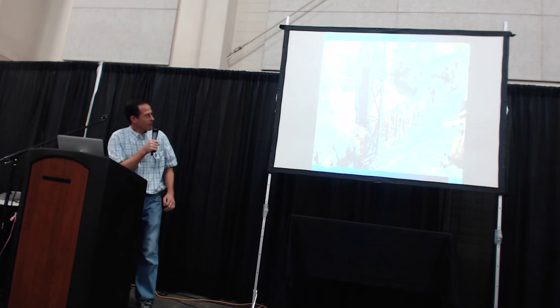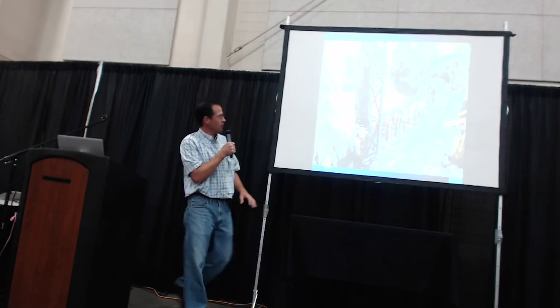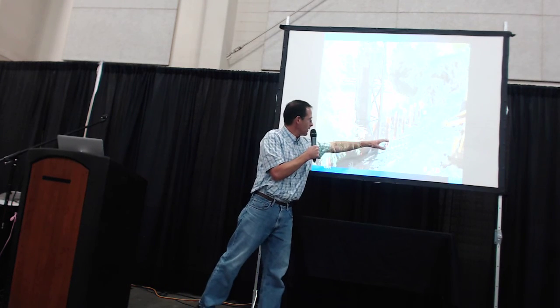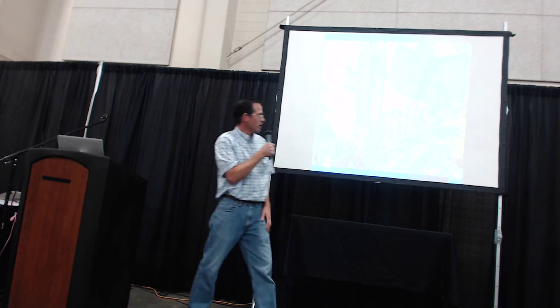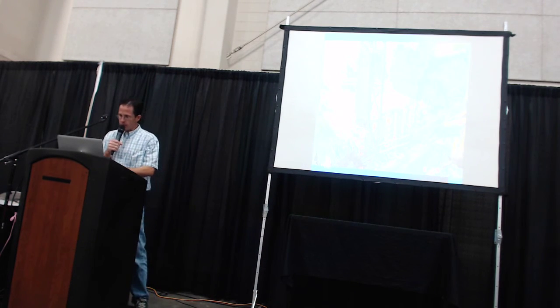I can't remember why I put that one in there, maybe just to show the marks on the piles when the inspectors are doing the blow counts. Each one of those marks represents 1 foot, and so you count the blows per foot as they're driving.